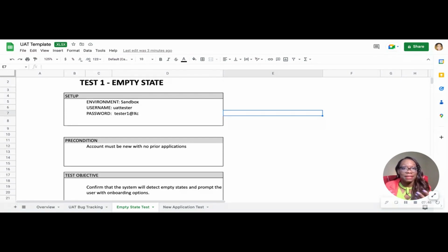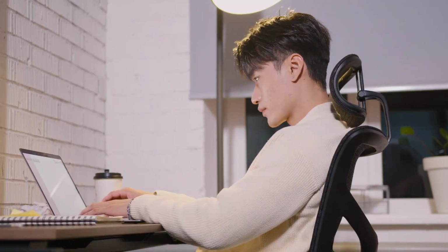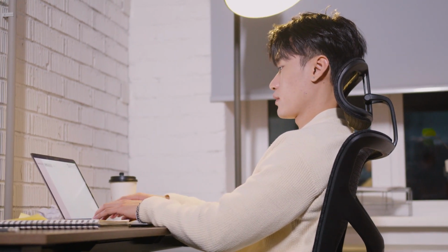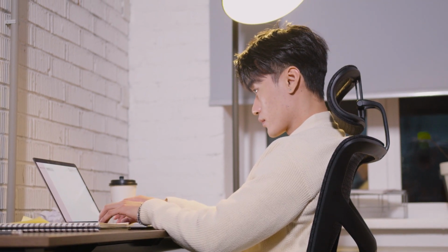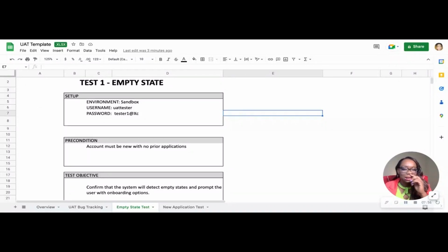Plus, testing is a very repetitive task. They're not QA, this is not their career, so it can become frustrating. How can you make it easier on them? One of the ways is by helping them to complete the test, tab by tab. When they go through one tab and each tab is dealing with only one particular thing, they can complete that and feel like, okay, check, I finished this. And the next tab handles something else and they finish that tab, check, I finished this. So they feel like they're moving through the test, because you didn't give them one long thing with 500 test cases. It's too much.